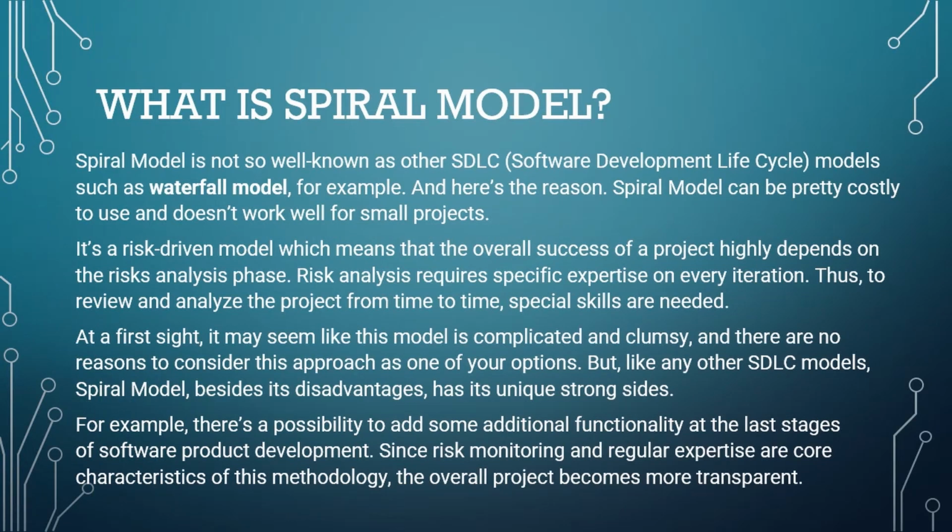What is the spiral model? The spiral model is not as well known as other SDLC models, such as the waterfall model. Here is the reason: the spiral model can be pretty costly to use and does not work well for small projects. So keep in mind that you cannot use the spiral model on small projects, and we're going to talk about why later. It's a risk-driven model, which means that the overall success of a project